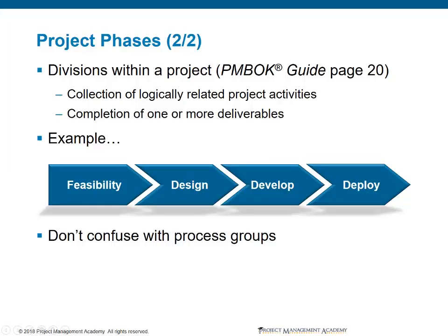It will be a collection of logically related project activities, and it will complete one or more deliverables that contribute to succeeding phases and the overall project deliverable. So for example, if we were attempting to design a new type of smartphone, we would begin with a feasibility study to determine the high-level requirements given to us by the stakeholders. Are they achievable based upon our organizational capability and current technology? The feasibility study would be the deliverable and the output of that phase.